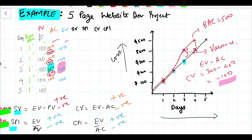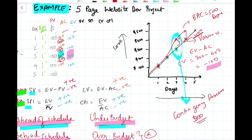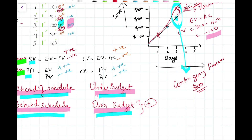The budget at completion is $500 and the work is done, but the earned value is only $400, leaving $100 of work with no remaining budget. On day three, when the variance first appeared, you should ask: do I have a contingency reserve? If you have an extra $100 set aside, use that. If not, go to your management reserve — get approval from your manager to use those funds.